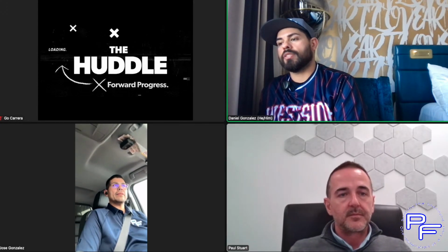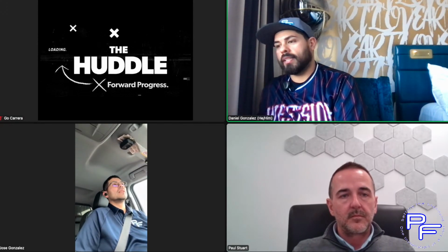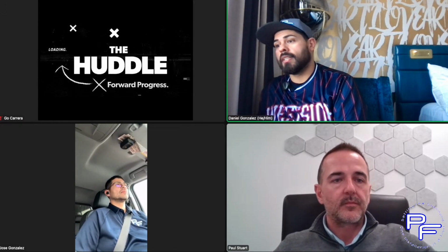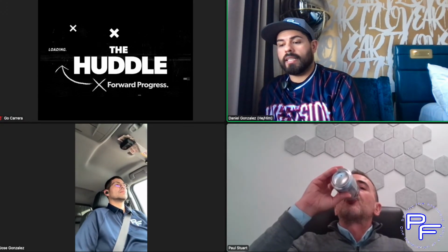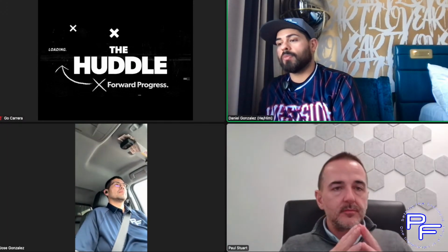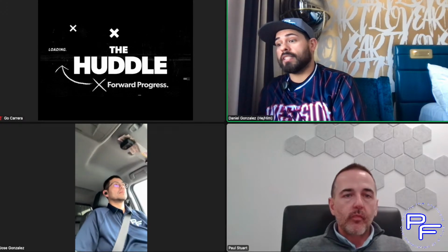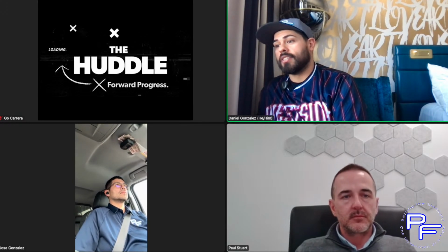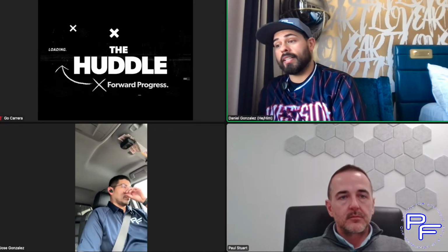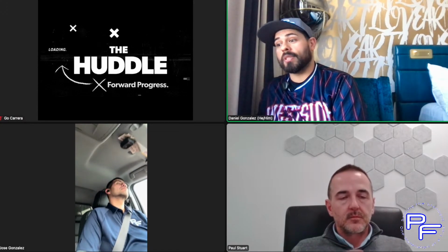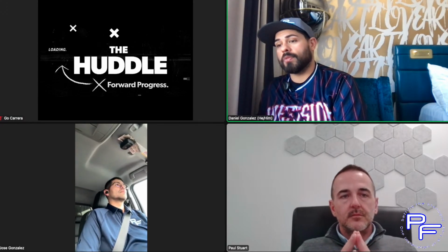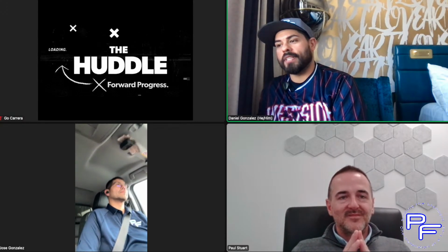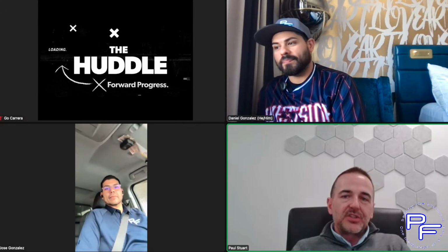I like the way you separated that number and actually put it in there: this is the cost of the mitigation. Because I talked to an electrical engineer, who's actually my son's baseball coach. He said that when they go out to bids, especially when they're training someone new, you have to ask these questions to make sure all these other people are including this stuff, because we're not going to not include it. So we need to make sure that either they're going to include it or the GC knows they're supposed to include it but didn't on their bid. That way it's a level playing field. But I can kind of see it both ways, where it's an advantage if you do and an advantage if you don't. Yeah, either way, you're in a better situation than not doing anything, obviously.